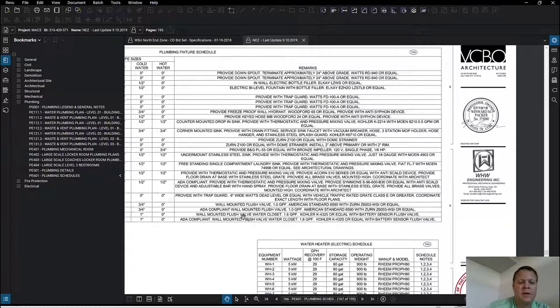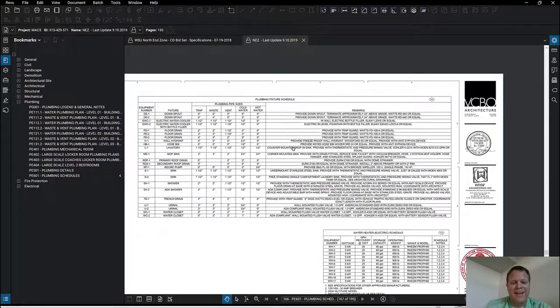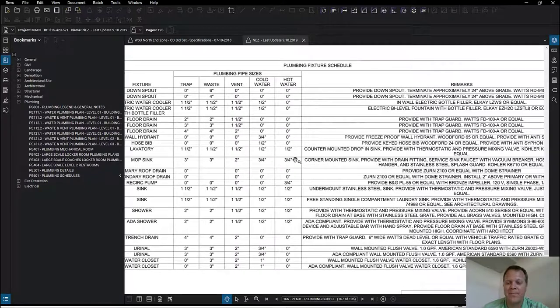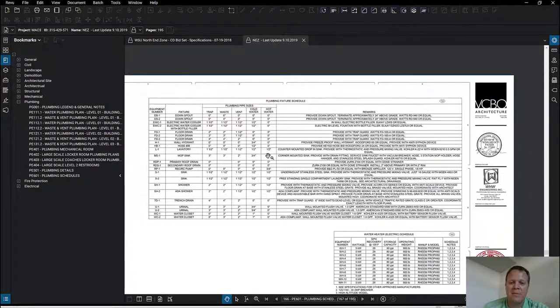Okay. Actually, it looks to be exactly the same to me. So pretty much you can ignore everything I've said. No. The schedule is more descriptive. It's in the drawings. It's typically more descriptive, and so you do want to be checking your schedules, meaning the lists, when it comes down to fixtures, and not just going to the specifications. So I'm trying to show both. All right, cool.